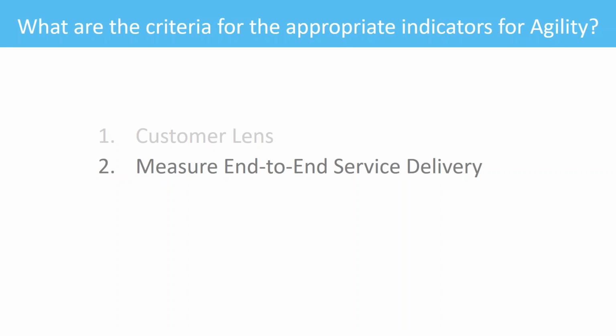But when we're measuring just siloed, when you're measuring only development, only marketing, only UX, only testing, without seeing the holistic view, this is depriving ourselves of enough data to measure how well we're satisfying our customers. Because a lot of times, if you're familiar with flow efficiency, or it's just common sense, once something is done, when you give it to another team, it doesn't necessarily mean that the team will pick it up right away. There might be some wait time in between. So even though the teams are all optimized, they're all locally busy all the time, the customers are waiting. And why are they waiting? Because the work is waiting in between the teams. That's why instead of measuring per team level, we're trying to measure the end-to-end service delivery system.